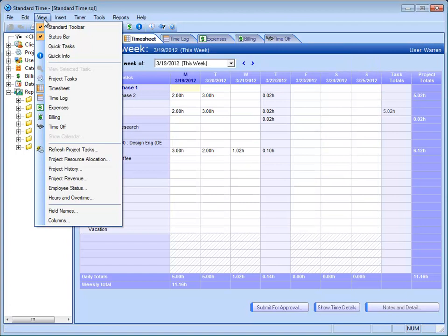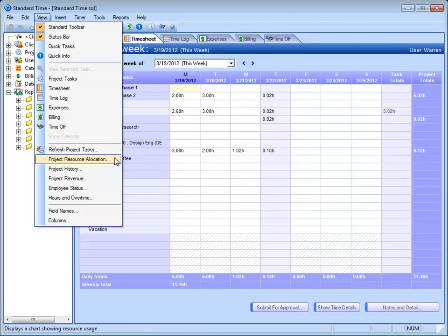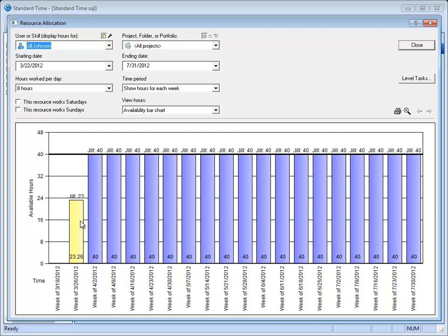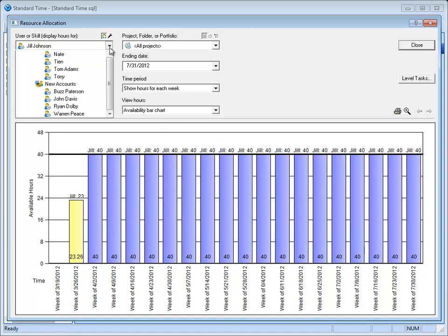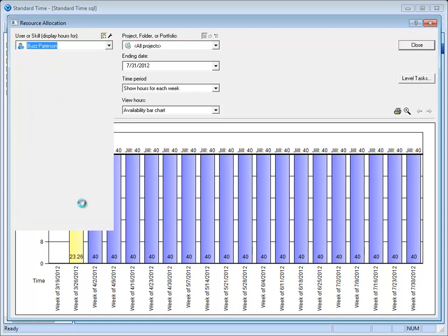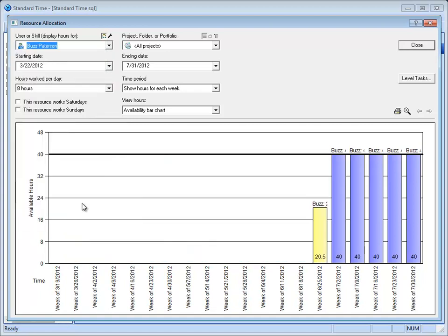And then from a more project management side, I would say the resource allocation is pretty nice. So if you click on resource allocation, you can see the inverse, which I'm doing here. I'm seeing who is available. Right now, Jill is allocated in this week, but out into the future, she has plenty of time available to take on additional work. And you can look at this by department or company-wide. In this case, I'm just going to choose another employee. Let's just look at Buzz Patterson here. When I click on Buzz, you can tell Buzz is not able to accept any work clear out into July, and then he's available to take on additional work.